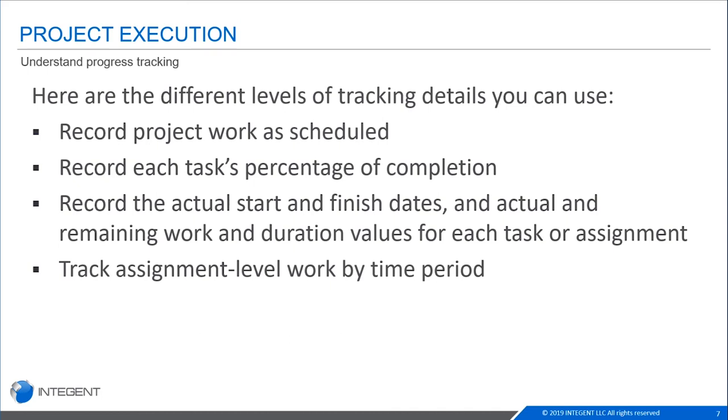And then you can always use what you have put into your current project schedule in a future planning mentality. It helps you to estimate your future projects better. If you know that these tasks are actually taking less time than you're planning every single time, then you can adjust your estimates in the future.